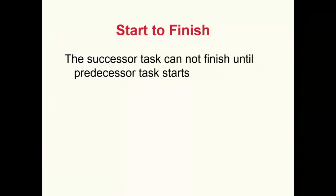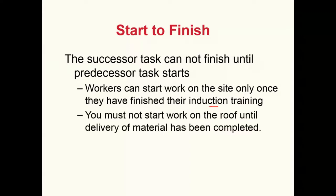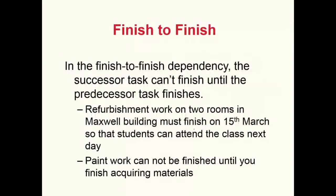The start-to-finish relationship means the successor task cannot finish until the predecessor task starts. Examples: workers can start on site only once they have finished their induction training; you must not start work on the roof until delivery of materials is completed. The finish-to-finish dependency means the successor task cannot finish until the predecessor task finishes — for example, refurbishment work on two rooms must finish by March 15th so students can attend class next day, or paintwork cannot be finished until material acquisition is complete. Finish-to-start and start-to-start are the most common, but these two other types are also important.